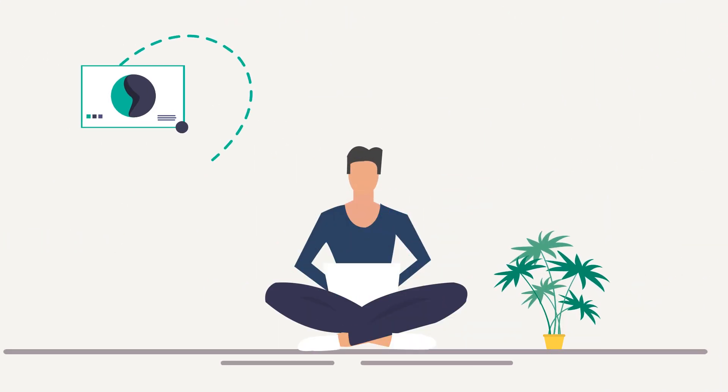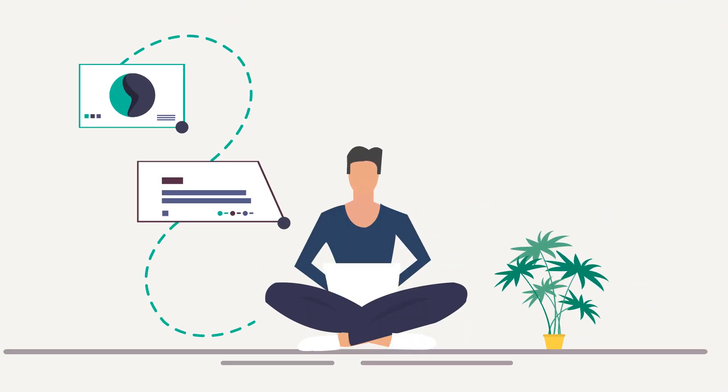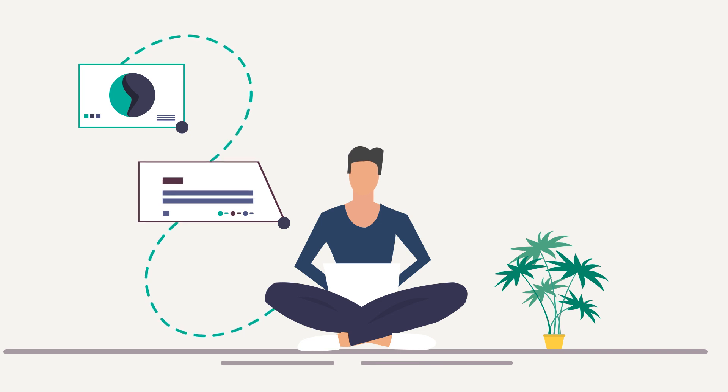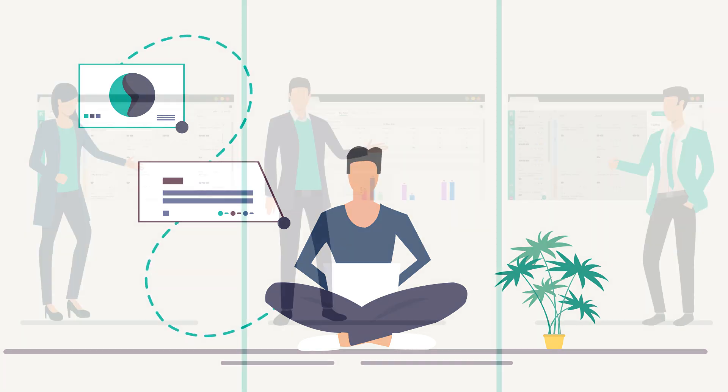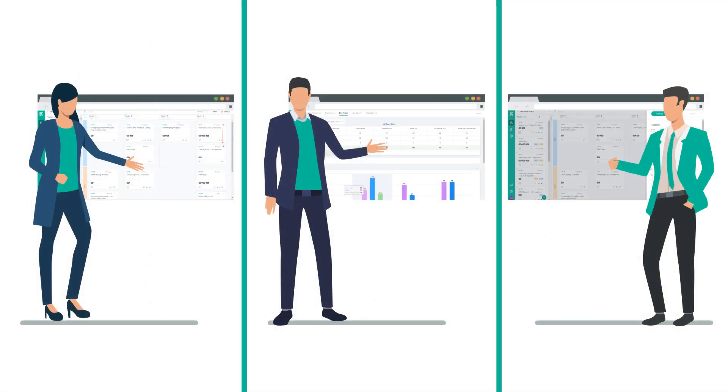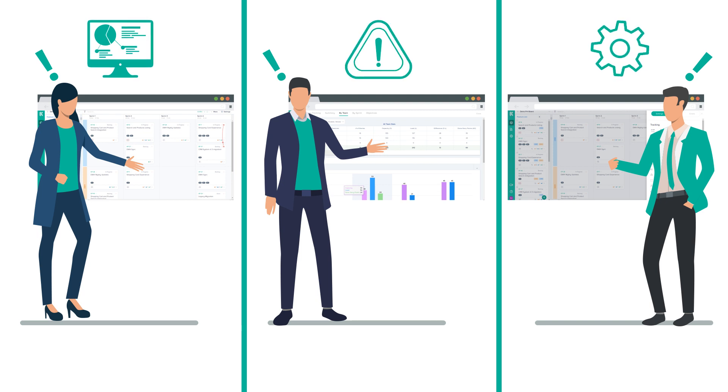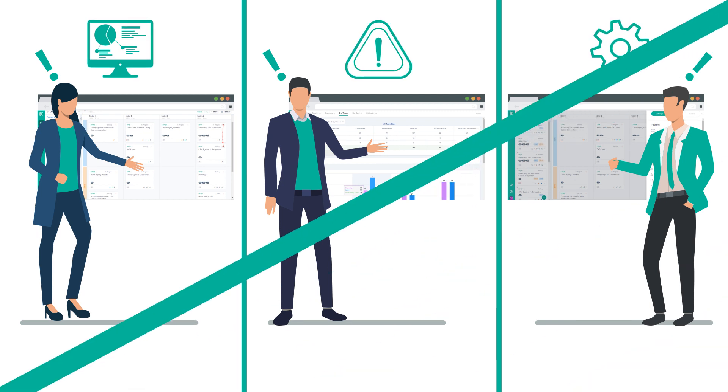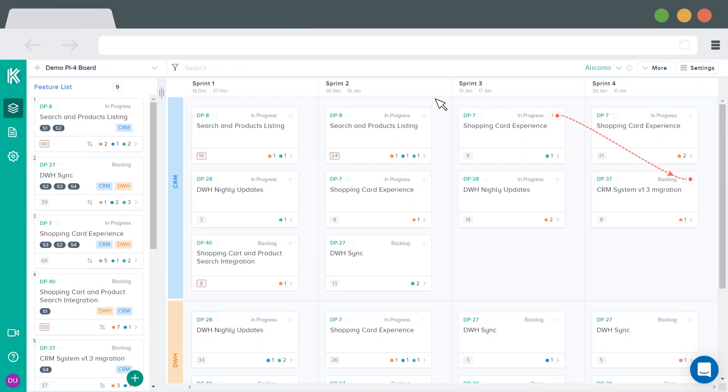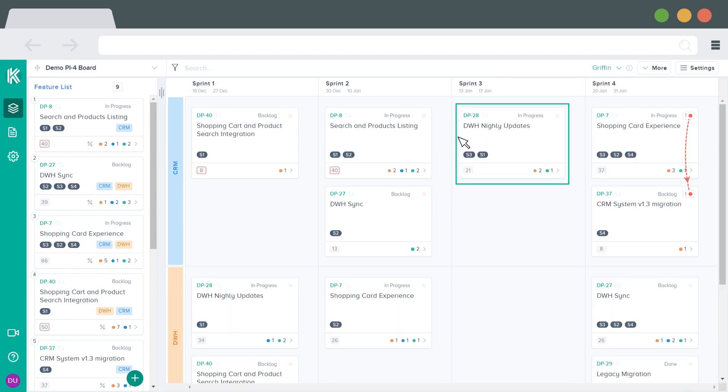Plan Review. During the draft plan and later in the final review, product owners from each agile team stand beside the large digital Kendis board, explain to the attendees their plans as well as mentioning dependencies, risks, or impediments that they may have discovered. Kendis board can be switched to separate mode to show when the feature will be completed by one team in Griffin view.